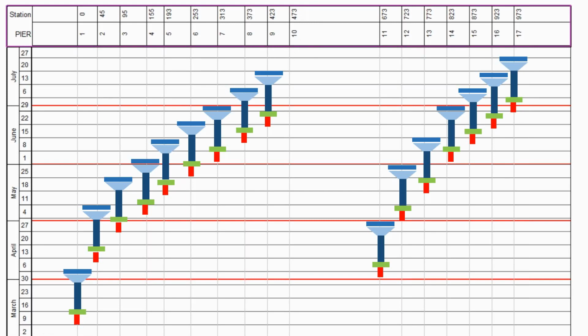One of the advantages of Tilos is that it gives you a very clear picture, a 1-page report, and explains which activities are planned, which activities are forgotten. It's many times happening in Gantt chart based systems. We forgot many times to plan some area. In the end, we just find out that we forgot it. And this is 17 piers. It's not a big and large project, but consider it. Sometimes we do 3,000 kilometers projects, and we've forgotten many areas of planning something. That's why it is one of the advantages of Tilos, displaying and immediately warning you that you have forgotten pier number 10.